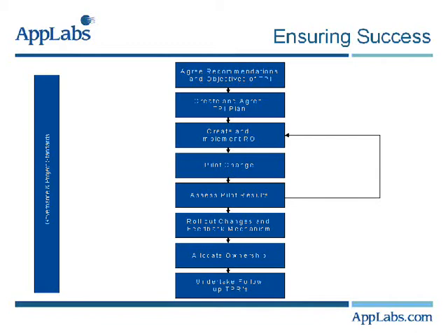If you are trying to implement a phased approach, it is important that stakeholders see some return of investment fairly quickly. Try implementing the tactical changes such as those that will give your organisation improvement quickly and strategic improvements that offer the most ROI. You will also need to build in a project plan detailing all tasks, resources and budget. This plan will need to be baselined and a change control process put in place. Again, normal project standards apply.